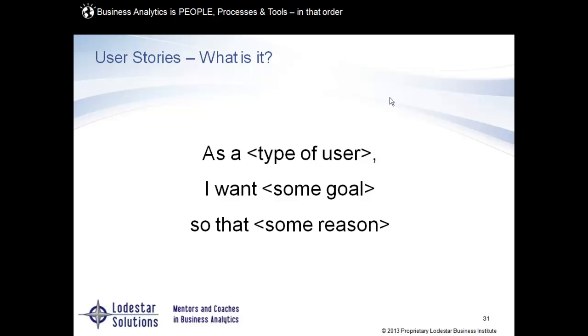And this is a template that many people use. It says, as a whatever type of user I am, I want whatever my goal is so that whatever my reason for wanting this information would be.